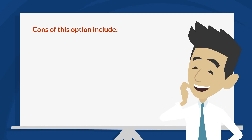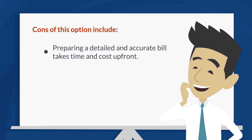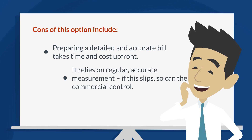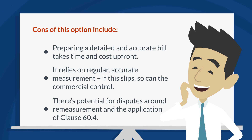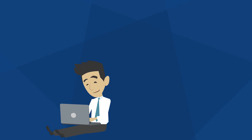Cons of this option include: preparing a detailed and accurate bill takes time and cost up front; it relies on regular, accurate measurement — if this slips, so can the commercial control; and there's potential for disputes around remeasurement and the application of clause 60.4.